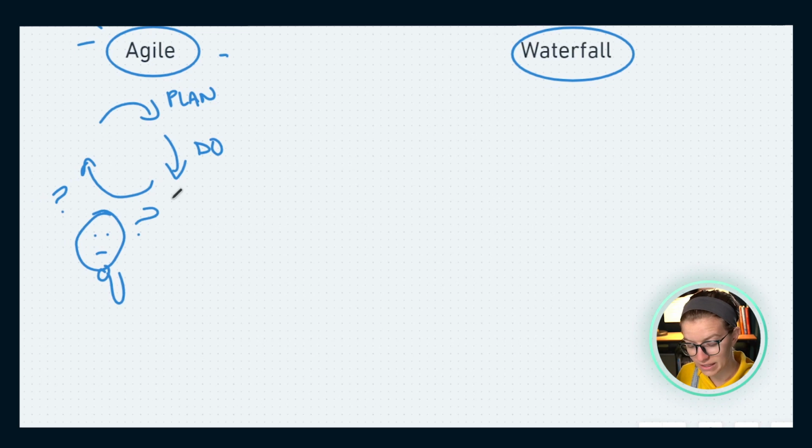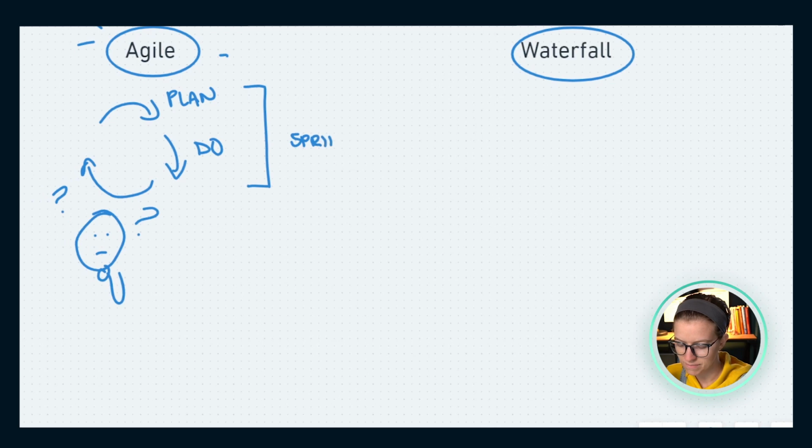If we are doing a lot of this planning and doing, we may not exactly know. We're going to move a little, evaluate, taking things in smaller pieces. Each of these cycles or sprints is something that we can view as a chunk of effort. And inside those sprints, we do things in chunks called epics, stories, and other pieces. These little chunks that we break things down into allow us to track how much we accomplish in a given project, help us track what doesn't quite go to plan, and help us plan for change. The whole Agile approach is really about expecting change, expecting new insights, and expecting to have to adjust scope as things go along.